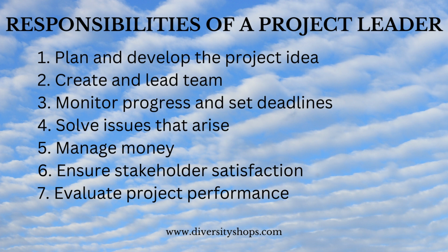4. Solve issues that arise. During every project, issues arise that need to be solved. The project leader is one of the first people that clients and team members seek when something goes wrong. As a result of that, it is in the project leader's best interest to anticipate any potential hiccups before they happen. Adaptability and problem solving are key to keeping control of a project. In addition to that, project leaders need to have a plan for change or expansion in a project's deliverables throughout a project, also known as scope creep. This usually occurs when the scope of a project wasn't properly defined from the start, and it can seriously affect the timeline and budget.